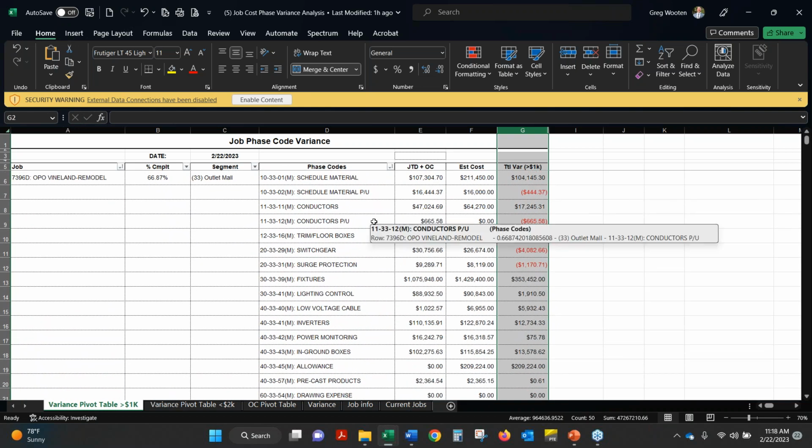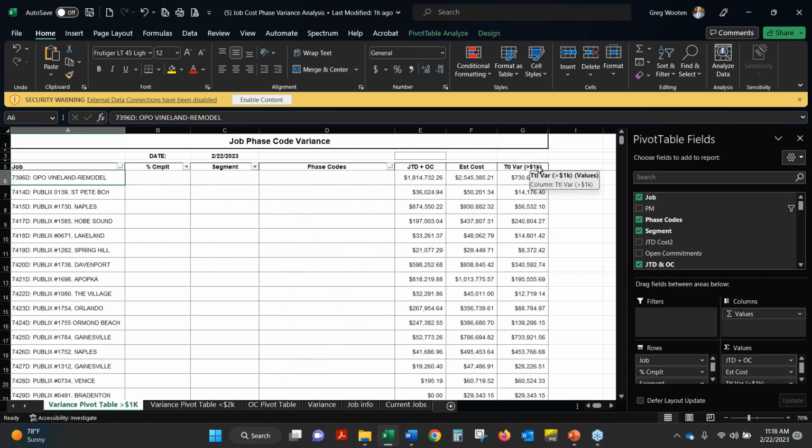So this was just a nice list of, hey, let me check this every so often, see where I'm at, and go ahead and review whatever needed to be addressed based on these. Here, you can do all kinds of different setups, but this was anything over $1,000 over the variance. So you can set a range, you can do a bunch of different things that'll give you a nice clean analyzation of your costs currently for your projects, and a nice short list view.